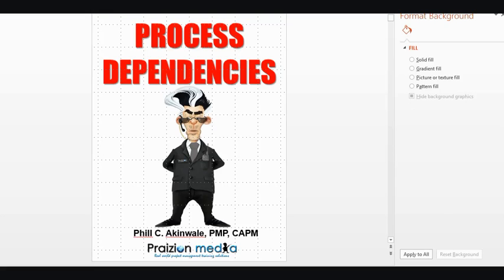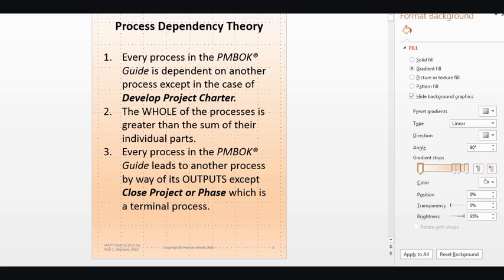So I coined this phrase — I call it process dependency theory. What is process dependency theory? It states: one, every process in the PMBOK Guide is dependent on another process, except in the case of Develop Project Charter. The second is, the whole of the processes is greater than the sum of their individual parts. And the third is, every process in the PMBOK Guide leads to another process by way of its outputs, except Close Project or Phase, which is a terminal process.